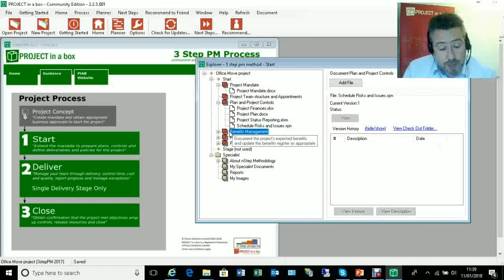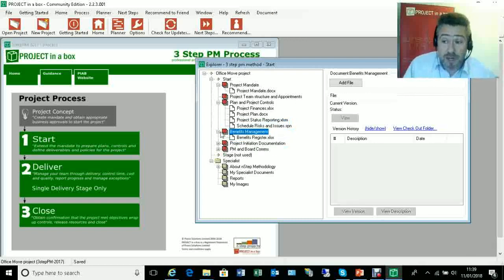Now in many projects we'll come down and think about benefits management here as well. It's an important part of the business case actually. If it's a regulatory project we have to do it or we're going to be out of business, well, it's a pretty clear case that we need to do it. We may still undertake some benefits management because it might help us understand what else there is to gather out of this project. We're complying to regulation, therefore there are some reputational benefits, and we can try and do things to help maximize those, which bring us something else, perhaps other than just being in business still.